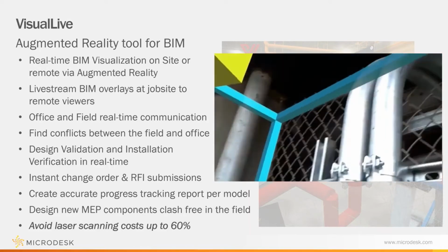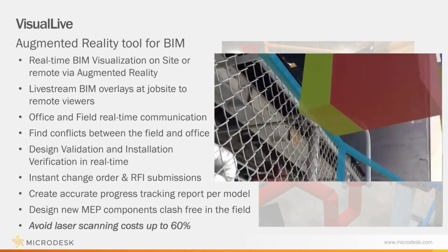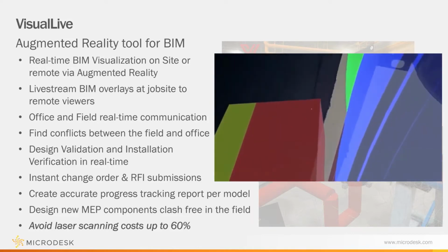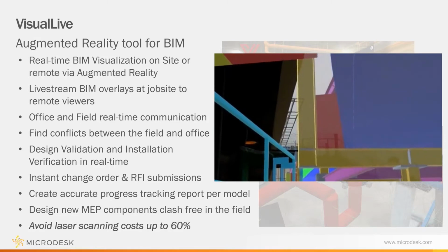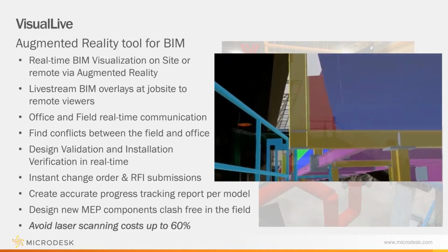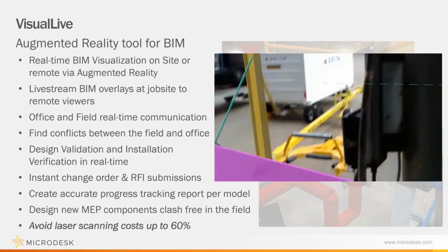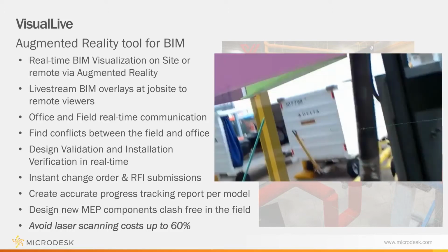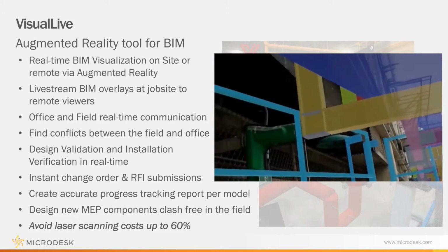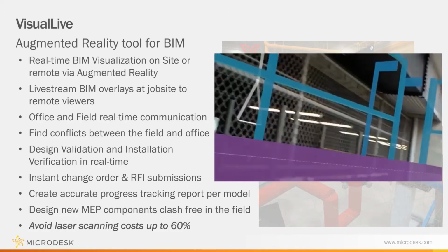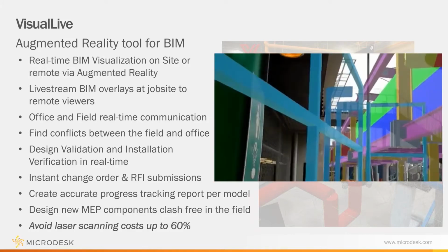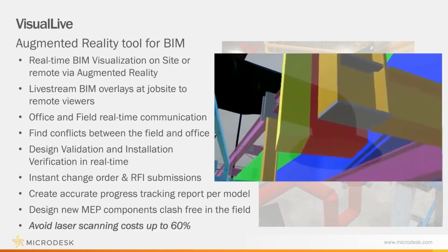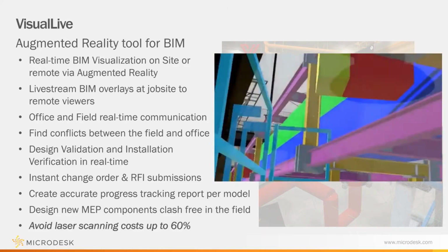And if you have multiple people with different headsets, or again, somebody back in the office doing the screen share, they're able to see exactly what you're looking at, even from different angles. So it's a tool that allows me to avoid finding out that something doesn't fit too late. I can walk around and see the intent. I can see how the design is going to interact with the real world. And then I can start making changes or preparations beforehand. I'm not waiting for it to show up on site and then realize that, ooh, this isn't going to work.